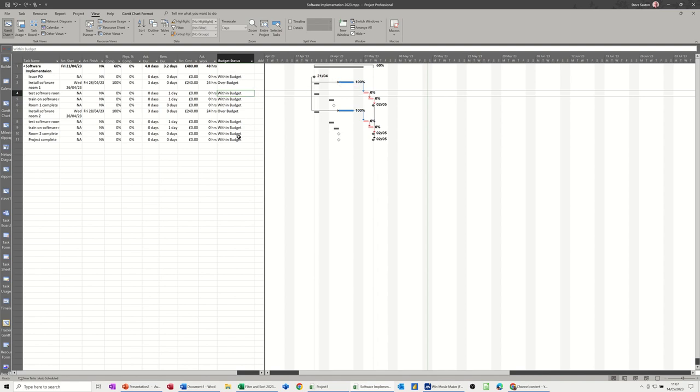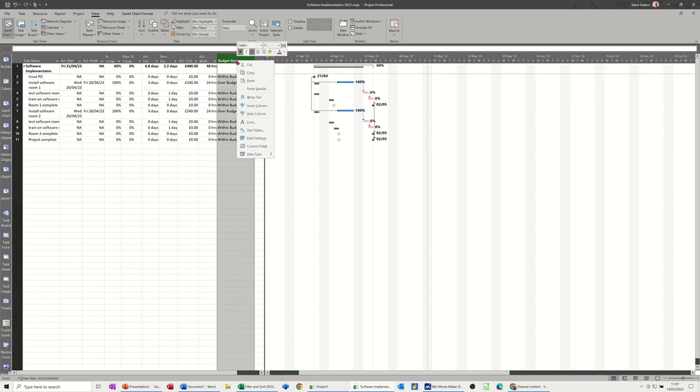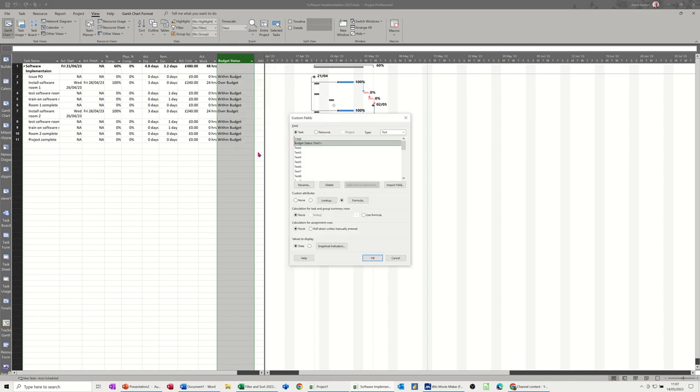Now that's great, but I want that to be a traffic light symbol. If it's over budget, I want it to go red. If it's within budget, I want it to go green. So if I go back into this, right click on the top, custom fields, still on the first one, text one, going for graphical indicators.